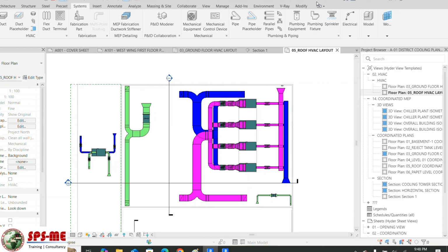Okay. Cost, what software we have to learn now? Which one? For cost, what cost software? Yeah. This is what I'm saying. Cost, two types, two things are there in Revit. One is cost planning. The other one is cost estimation. Okay. For the cost planning, the Synchro or the Excel Manager, any of the software, you can use it. Okay. Cost planning. Okay. But cost estimations, you have to use the software called CostX.